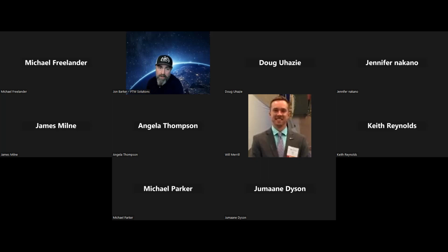So I'm like, okay, well, there are 1 million hours in here. This was a $50 million contract. My average rate is $50 an hour, less ODCs. Again, you have to make assumptions, of course, but it's how much specificity can I get? I will tell you this.